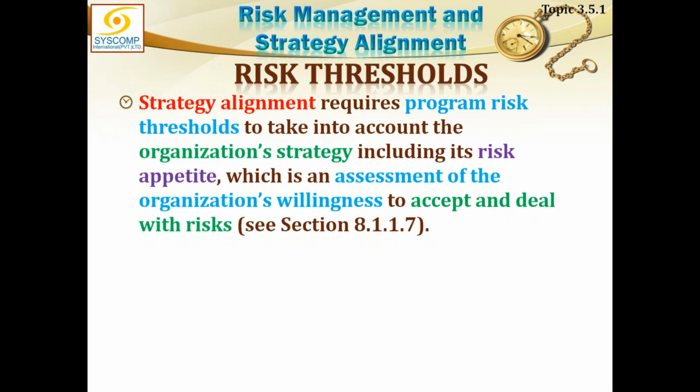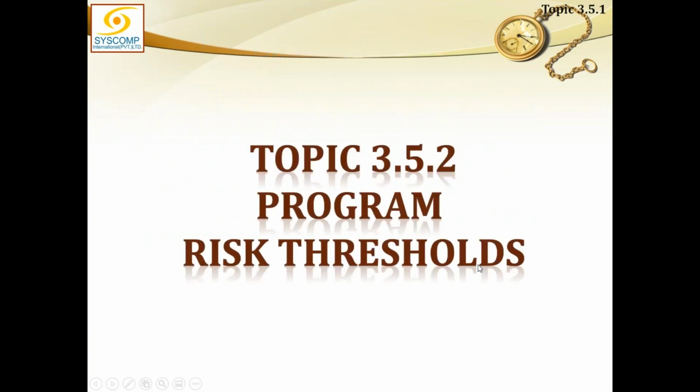Any risk which falls into my normal appetite, so I have already decided I can bear the loss of this much risk, doesn't matter. I will accept it as such. But if it is beyond that limit, then probably I have to identify it as a risk and then create a proper analysis and ultimately the response. So the response strategy is developed here, not exactly the response. Response is not being established here.